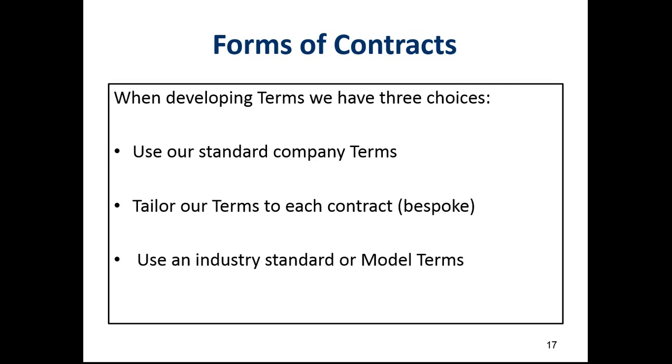Internationally, for construction projects, we tend to use FIDIC. The FIDIC terms are laid down in the red, blue, yellow, silver books, different sets of terms for different uses for international contracts. So they are used by different companies depending on what their need is for that contract, but they're all different, so you need to understand how to use model terms.